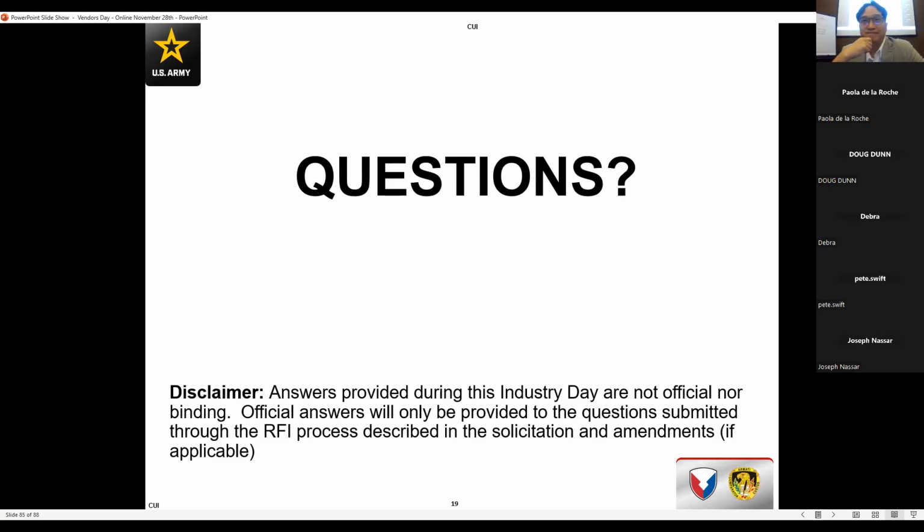Proposal manager role. I'm not sure exactly what that entails, but ultimately, you would follow what the solicitation requirements are. Typically, there's a section that covers the information to vendors, whether it's 52.212-1 or the Section L and M sections, depending on the type of solicitation. You're going to have information to offerors and evaluation factors to consider. So those two sections, 52.212-1 and -2, and Sections L and M, depending on the type of solicitation, are going to cover what information you're going to submit and how the information is going to be evaluated.